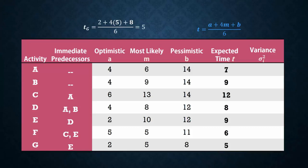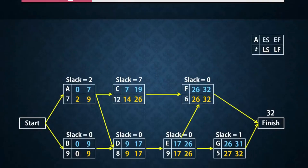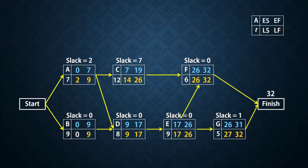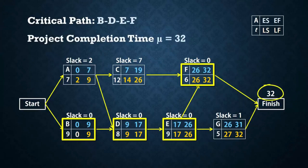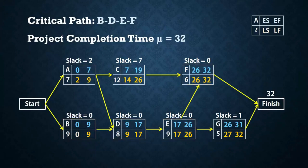Using these expected activity times and predecessors, I completed the project network from scratch in an earlier video. You will find the link provided in the description. The critical path is B, D, E, F and the project completion time is 32 weeks. Note that the project completion time can also be found by adding up the activity times for critical activities.